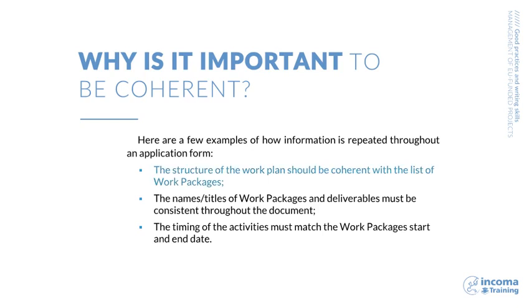The work plan described in Section 4.1 must match the list of work packages. You should not mention the existence of 6 work packages in the work plan section, and then include 8 work packages across Section 4.2. The same applies to the names of work packages and deliverables, which must be the same throughout the document.